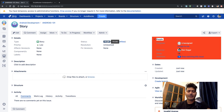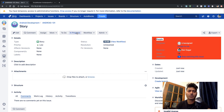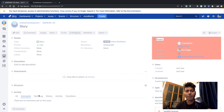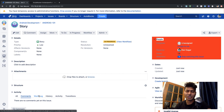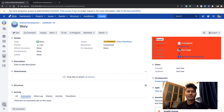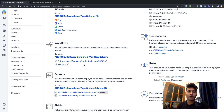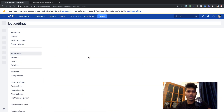So if I am on this particular story and I move it to In Progress, the current status is To Do and the moment I change the status to In Progress I want one or two subtasks to be automatically created. You can use Script Runner and a post function, but we also want to add a condition - we don't really want to do it every time. So let us first go to the workflow.